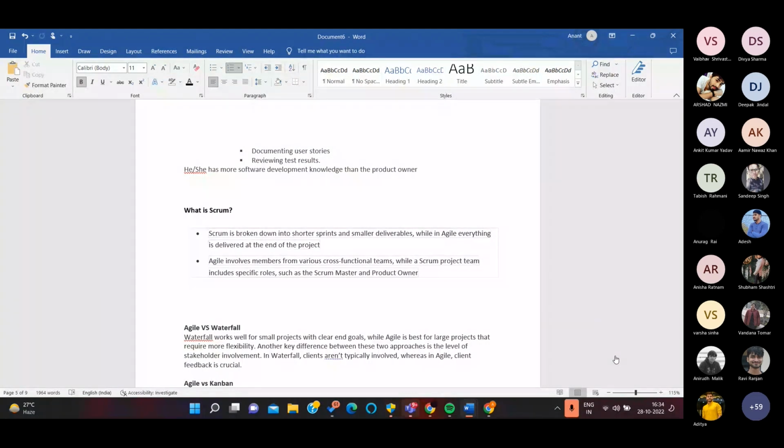So sprints do vary from project to project, product to product, and humans to humans. Like what exactly, how small do we want the sprints to be? So it usually varies from 5 days to 10 days. And during that sprint, what exactly a team will be focusing on, targeting, or achieving is part of a sprint. So that is what an agile Scrum does.